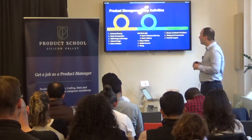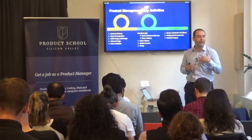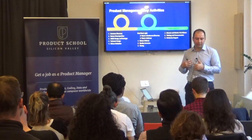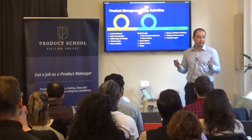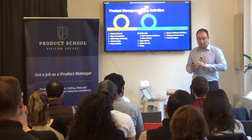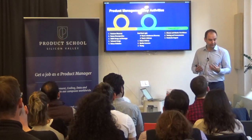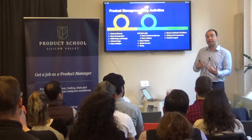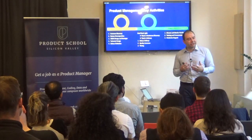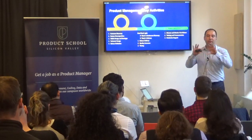Right? So once you get the feature set, that feature set will serve you to do the first pass of feature prioritization. Think of it as the business will come to you and ask, when can we get this feature done by? And you haven't written any user stories or any technical designs, you know nothing. But still, you need to come up with a sense of delivery time frame. So what we do is we come up with a 50% confidence roadmap, where we do some t-shirt sizing in terms of feature size with engineering, of course. And we use the story map